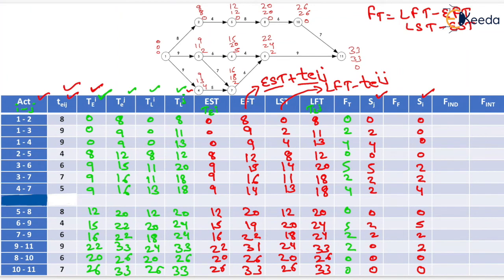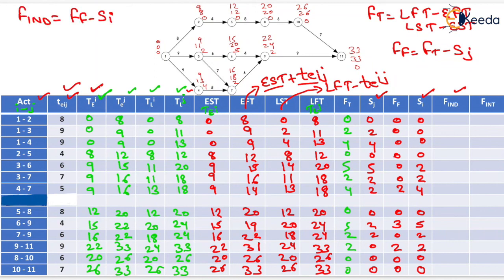Free float equals total float minus slack of the j-th event. The free float values are: 0, 0, 0, 0, 0, 0, 2, 0, 3, 0, 2, 0, 0. Independent float equals free float minus slack of the i-th event, giving: 0, 0, 0, 0, −2, −2, −2, 0, 0, 0.